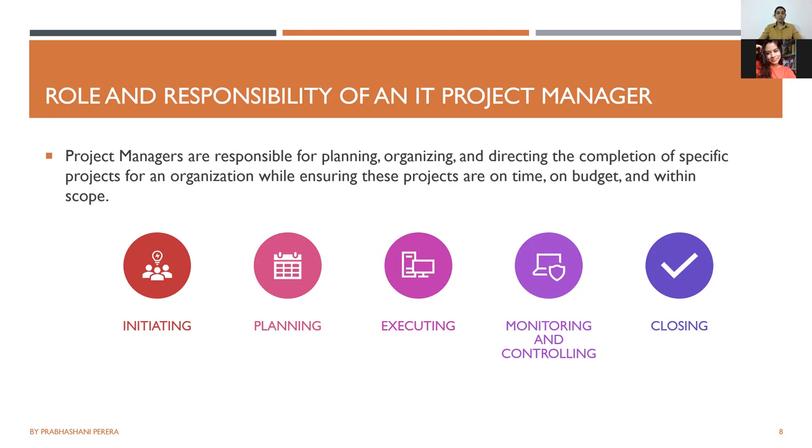Like maybe we are planning a project for 12 months, and we are making an assumption for human resources that 2 key people who are working on another project are going to finish that project and join by the 3rd month of this project. So maybe this could be an assumption, or maybe it could be anything related to the environment, or a new technology, things like that.